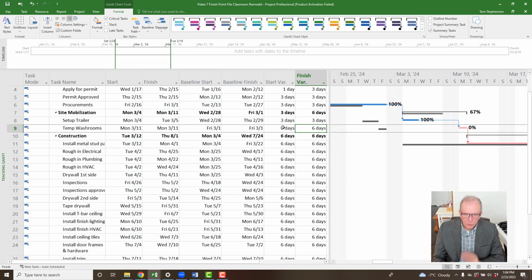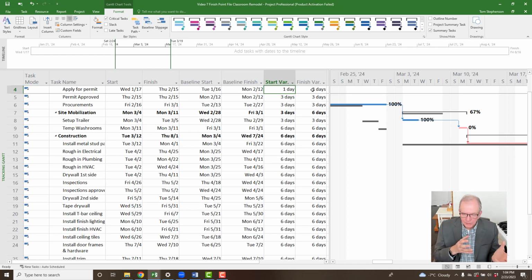So what you want to do with this is document this. Like, why did this start 1 day late and why did it take 2 days longer? I'll talk about this in another video, but why did it start 1 day late and finish three days late, right? So there's two things going on. Something like, why weren't we set up on time, and why did it take longer duration to do it? They're different questions with different answers.